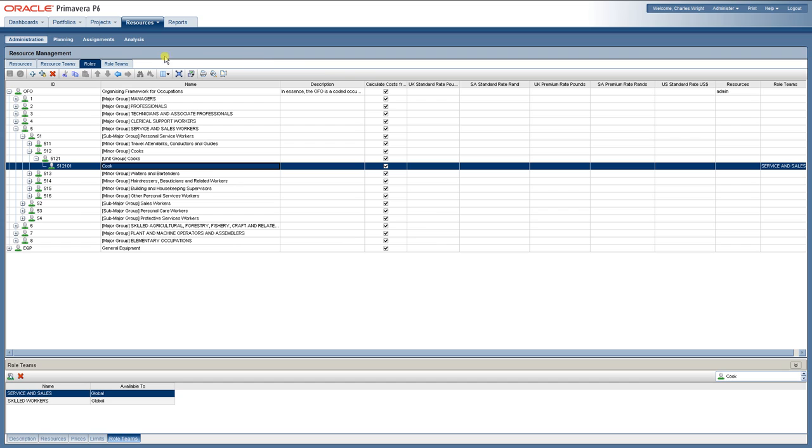And yeah, that's it. Obviously, the question you might be asking is, well, so what? What are the benefits of doing this? Well, the role structure from P6 is a central library of roles to plan projects. If you are a planner or you've been planning projects in P6 or even with any other software, you really should be following the rule of you plan with roles and you execute with resources. It's a guideline. If somebody gives you a fully resource-loaded schedule, you should actually throw it away.